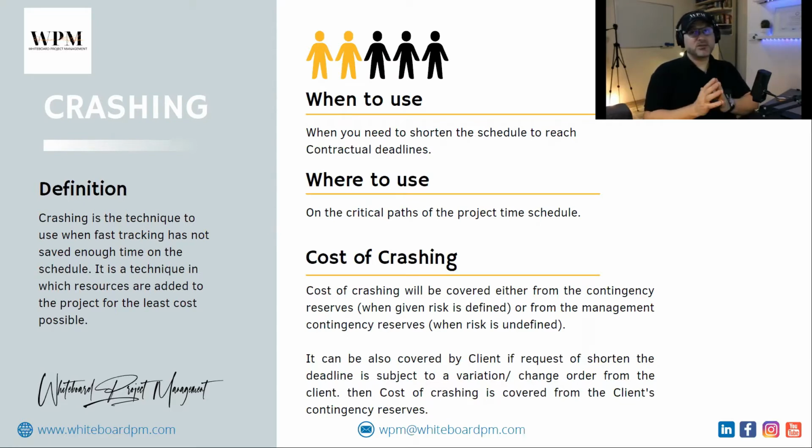For all cases, as mentioned here, the cost of crashing will be taken from the contingency reserve if the risk is defined. That means you as a contractor are executing the project and there is a risk of not fulfilling your deadline. You have defined your risk. That means for this defined risk, you have a contingency reserve.